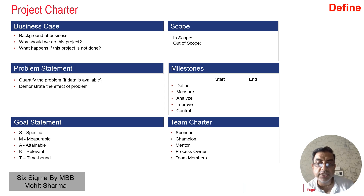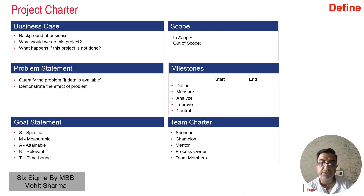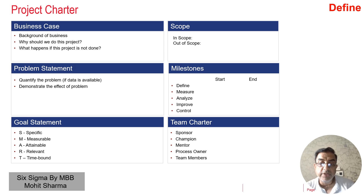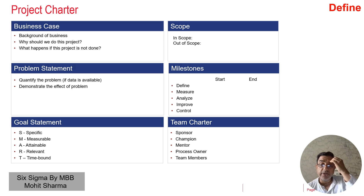The project champion is the person who leads the project, and the black belt or green belt assists the champion to achieve the project goal. Six Sigma resources will use their technical and analytical skills to help the champion achieve the goal. The mentor would be a quality person — a master black belt for a black belt project, or a black belt for a green belt project. The process owner is the person whose process the goal is defined on, and team members help with brainstorming, data collection, root cause identification, and implementing solutions in the improve phase.